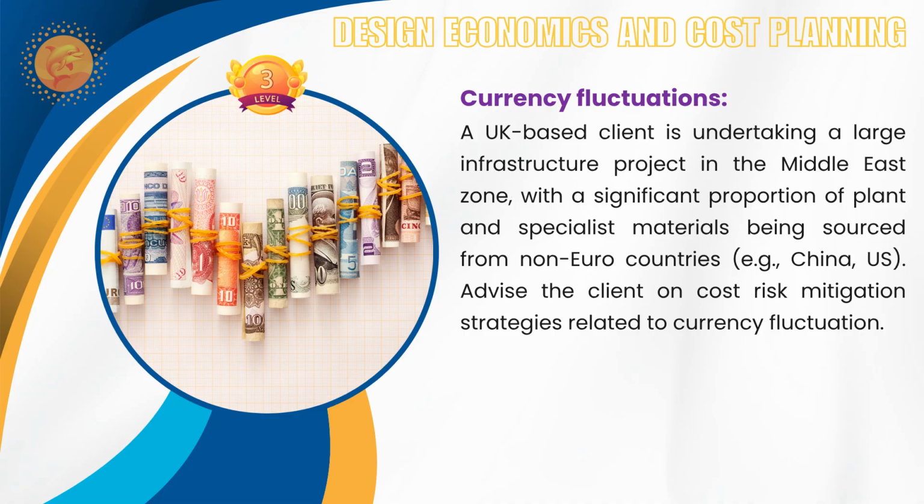And procurement: you can source the materials from wherever it will be more economical based on the currency zone. Because you have choices between China and the US, you can decide which location you want to take advantage of. That one also you can consider. So we have to take into consideration the fluctuation in that particular country also. That is also something you have to keep in mind, and allow some risk percentage as contingency.